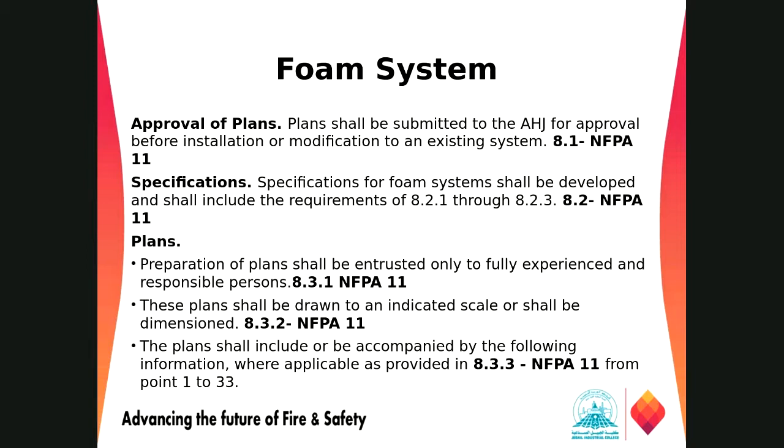The approval of plans shall be submitted to the authority having jurisdiction for approval before installation or modification, right, as per 8.1 of NFPA 11. The specification shall be developed and shall include the requirements of 8.2.1. Regarding the plans, we have some information in 8.3.1, 8.3.2 and 8.3.3.